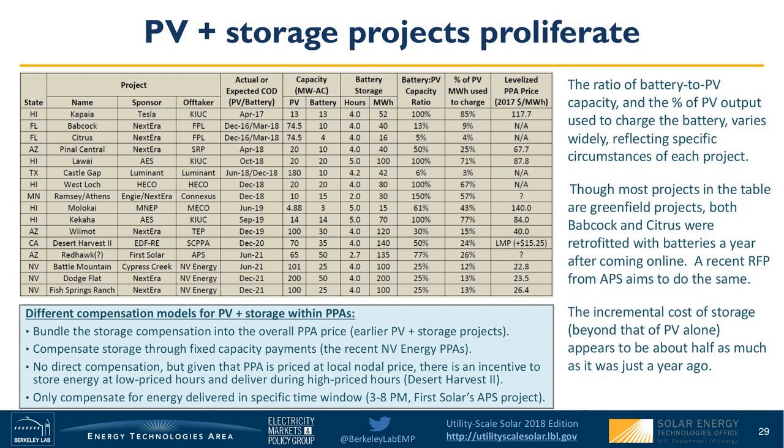And then in another interesting case, there is no direct compensation for storage within the PPA, but because the PPA price is based on the local nodal price, the project sponsor has an incentive to store solar energy during the low-priced midday hours and then deliver it later in the evening when prices are higher. Similarly, Arizona Public Service has signed a contract in which they'll only pay for energy delivered between the hours of 3 and 8 p.m. So there is some interesting innovation happening contractually in these early days of PV plus storage.